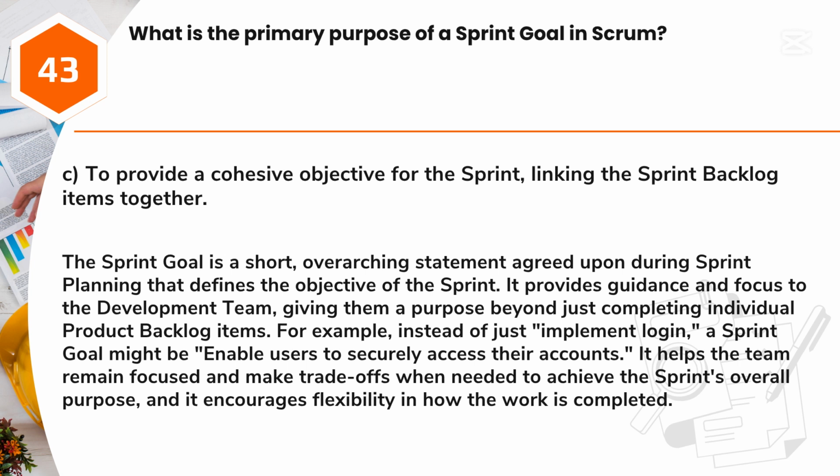For example, instead of just "implement login," a sprint goal might be "enable users to securely access their accounts." It helps the team remain focused and make trade-offs when needed to achieve the sprint's overall purpose, and it encourages flexibility in how the work is completed.